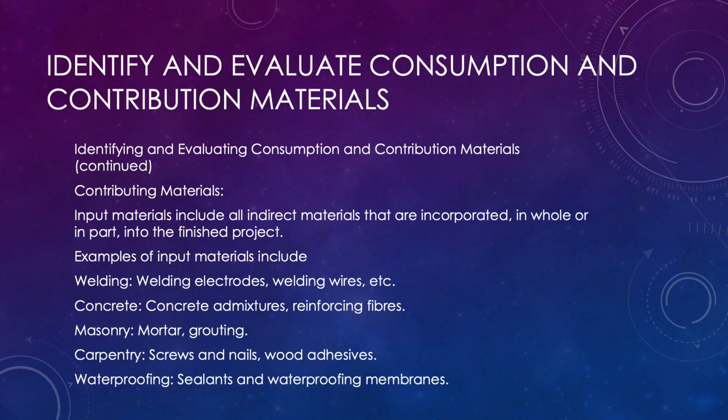Contributing materials. Input materials include all indirect materials that are incorporated, in whole or in part, into the finished project. Examples include welding electrodes, welding wires, etc. Concrete, concrete admixtures, reinforcing fibers. Masonry, mortar, grouting. Carpentry, supplies used in carpentry, such as screws, nails, and wood adhesives. Waterproofing, products used in waterproofing, such as sealants and waterproofing membranes.